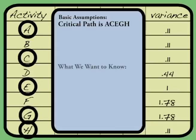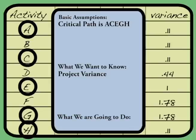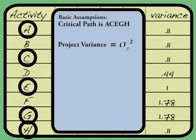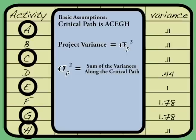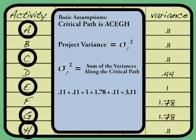For activity A: pessimistic time of three minus optimistic time of one, divided by six — so two divided by six, squared — equals 0.11. For activity B: pessimistic time of four minus two, so two divided by six, squared, gives us 0.11 again. We fill in our chart with the variances. We want to know what the project variance is — it is the sum of the variances along the critical path: 0.11 plus 0.11 plus 1 plus 1.78 plus 0.11 gives a total of 3.11. So our project variance is 3.11.